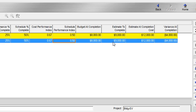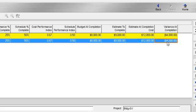So if my estimate to complete is $9,000, and my actual costs are $3,000, my estimate at completion will be $12,000, and you'll see how my variance at completion changes accordingly. So again, I'm using CPI in the calculation of estimate to complete, and it's regarded as the minimum total required costs.